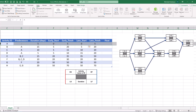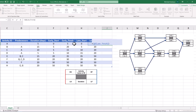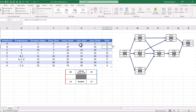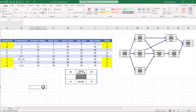You may want to calculate float or slack since we have all the required data. Click on the cell related to activity A, press the equal sign, select the late finish cell, then press the minus sign and select the early finish cell and press Enter. You can see that activity float is calculated for all tasks. Those activities with zero slack are critical, including A, B, F, G and H. Float calculations can also be done by subtracting early start from late start for our project activities, which will have the same results.